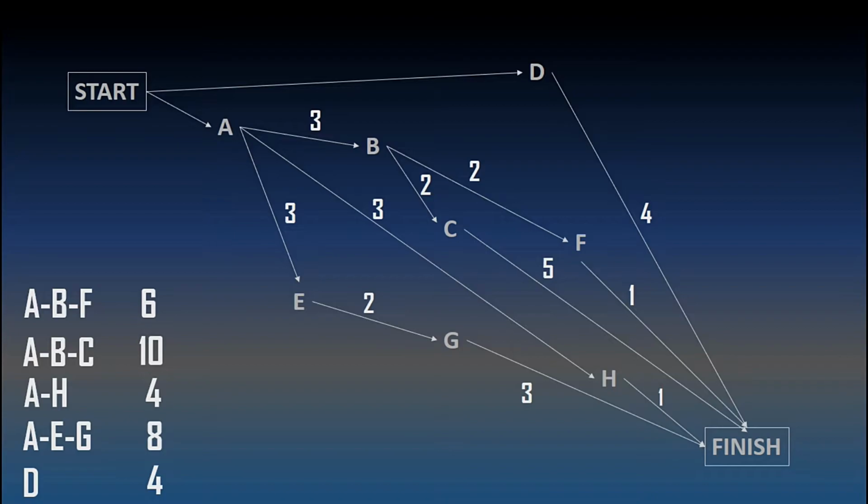Then 3 weeks later, tasks B, E, and H can be started. The difference between the critical path and the regular paths would be between the words "has to be started" and "can be started". After you have completed task A, you can slack off on task E for 2 weeks and you can slack off on task H for 6 weeks.